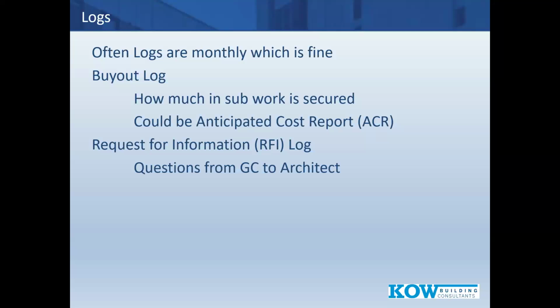For us, and this is something that I mentioned kind of the face-to-face, we want to see what are the questions. Do there seem to be some issues or some real holes in the plans? Is the architect replying to those RFIs in a timely manner? We don't want to see the contractor delayed because the architect may be very good conceptually, but is really lacking getting those information responses back to the contractor. So we want to see if it's painting a picture that, for example, maybe the architect is very busy, they bit off more than they could chew, and they're not getting those replies back.